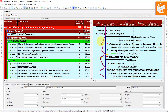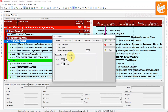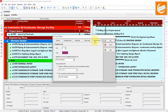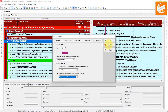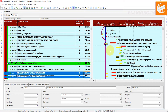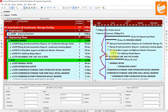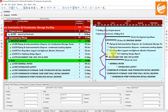If I select the duration percent complete, go to the Bar Chart option again, select Progress Line, choose remaining duration, and click OK. Now you can see the behavior has changed again. This is how the progress line option works and how we can customize it in Primavera P6 software.